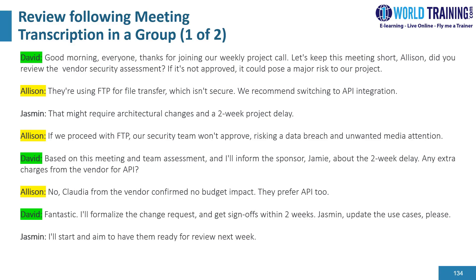Allison: they are using FTP for file transfer, which is not secure. We recommend switching to API integration. Jasmine: that might require architectural changes and a two-week project delay. Allison: if you proceed with FTP, our security team won't approve it, risking a data breach and unwanted media attention.